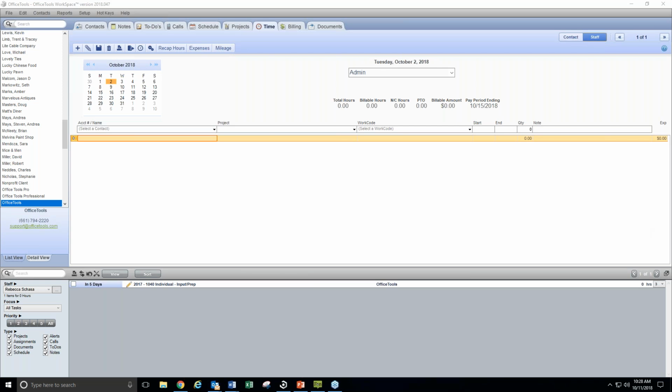All right, so are we going to have to change the holiday and then redo the weekly projects, or will it adjust going forward? If you change the project to move in the forward direction or into the reverse direction, and you're leaving that option on, you have to manually change it. If you want to go in and turn that option off, then it'll just roll forward with that option off from that point. So you won't have to recreate your projects or anything like that. But if you're going to leave that on and the due date moves, you'll have to reset it.